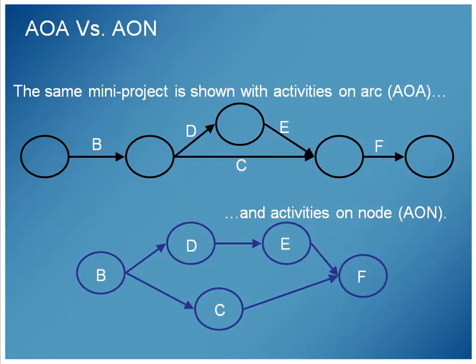So we're going to come up with a model for this called a network diagram. And AOA or AON are two options for how we're going to represent our networks. AOA stands for Activity on Arrow Network, where each arrow represents the task or activity and the nodes link the arrows. So in this AOA drawing, which is in black on this screen, the activity B is joined to the activities C and D by the nodes between those arrows, and the labels are on the arrows.